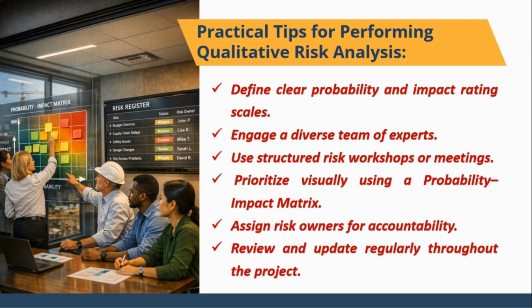same way. Second, the process should engage a diverse team of experts. Risk assessment is strongest when it includes perspectives from design, construction, procurement, health and safety, and project control. This diversity helps uncover risks that may be overlooked by a single discipline or individual expert. For example, a designer may spot structural risks, while a contractor identifies supply chain bottlenecks.